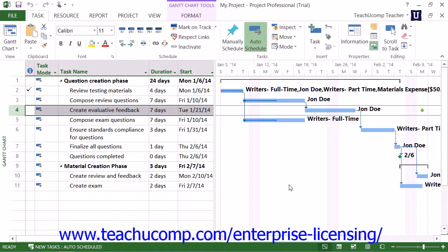You should now see a deadline date indicator appear for that task row within the Gantt chart view of your project file. If the task is ever scheduled beyond the deadline date, Microsoft Project will display a missed deadline indicator for that task in the Indicators column within the Gantt chart view.